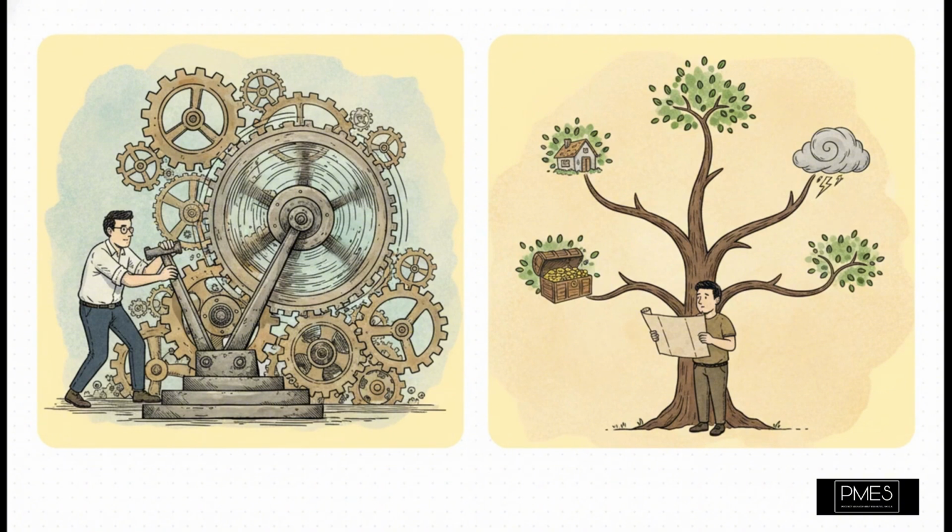We've got two other heavy hitters, and they do very different jobs. You've got sensitivity analysis on one hand. Its job is simple: find the individual risks that have the biggest, most powerful impact on your project. Then you've got decision tree analysis. This one isn't about finding the biggest risk. It's about helping you choose the best strategic path forward when you're facing a fork in the road.